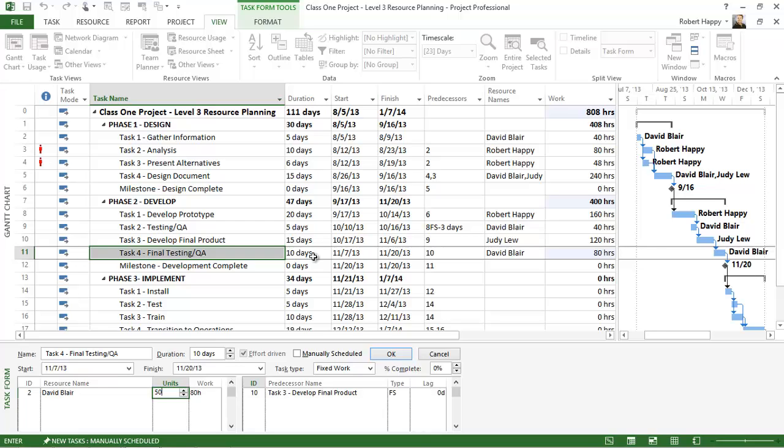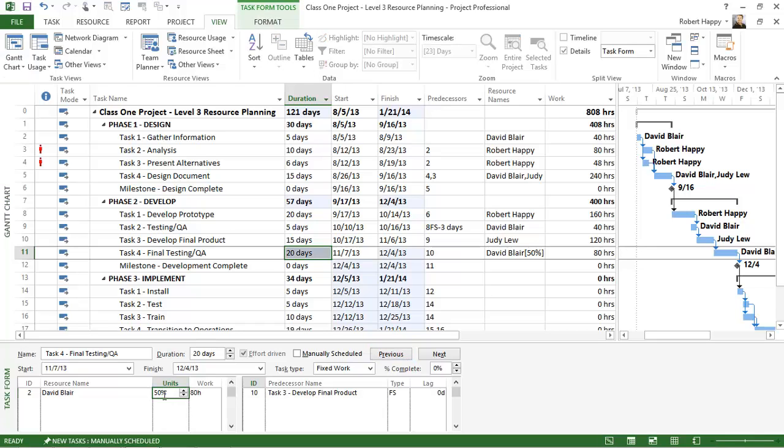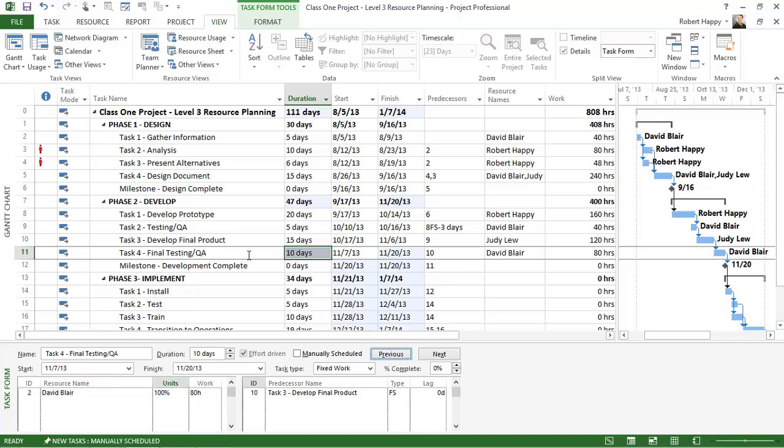In this case it's going to take longer than expected because I can only spend 50% of my time working on 80 hours worth of work, so that means the duration is going to go to 20 days. If I change this back to 100%, my unit is back to 100% then it goes back down to 10 days.